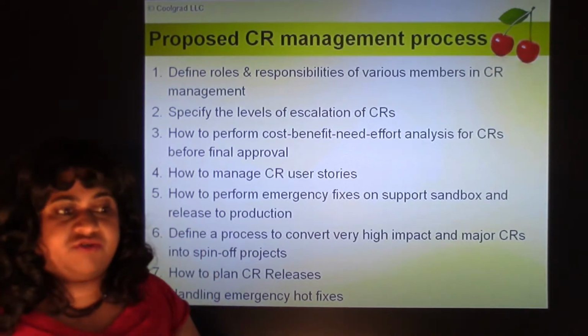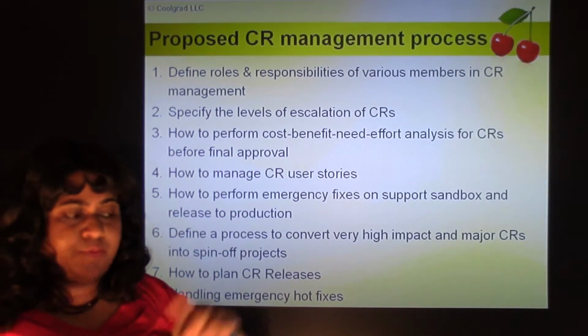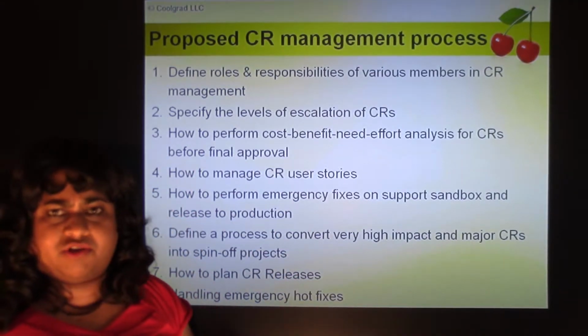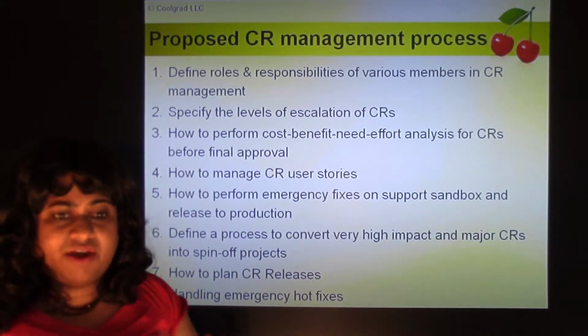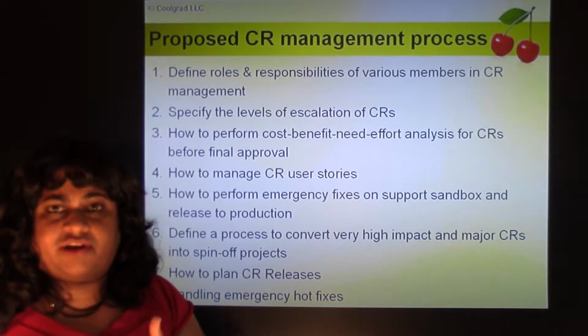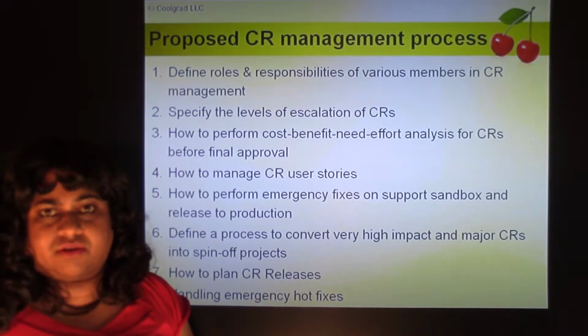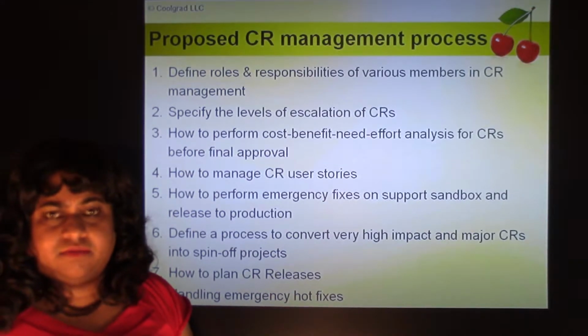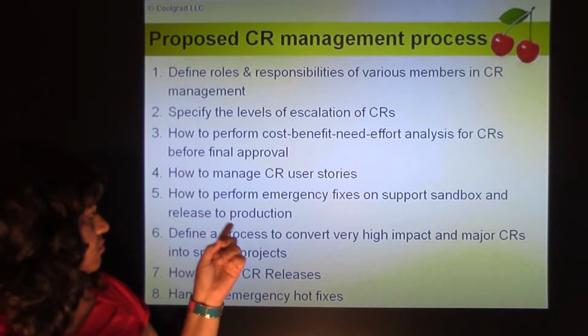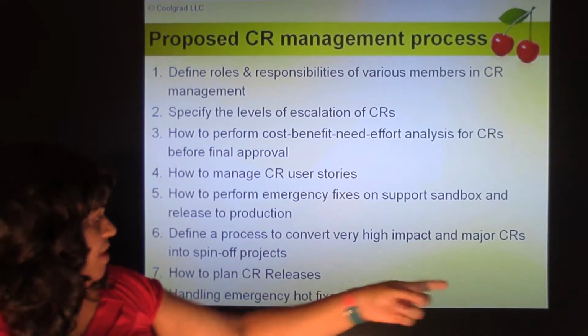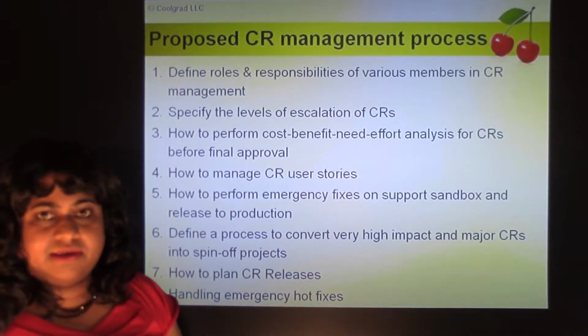So we have to do an emergency fix. You can't wait to fix it in development, again test it, UAT it, and again go into production during CR release. So you have to fix it as an emergency. It's called a firefighter CR or like a hot fix. Fix it in a sandbox and then put it into production. Emergency handling. So then define a process to convert very high impact and major CRs into spin-off projects.